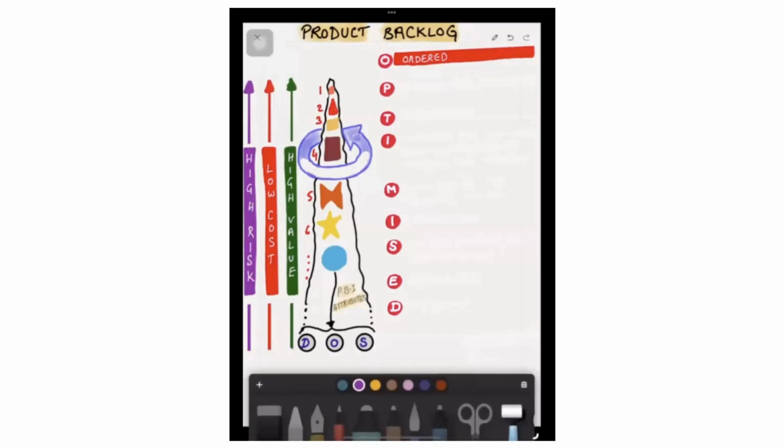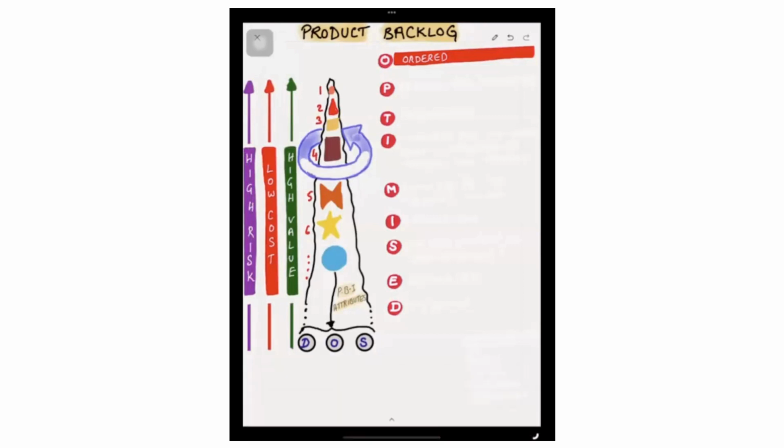The meaning of fail fast, fail safe is if you keep a risky item on the top of the product backlog, in the product timeline, it will come to early sprints. But if you try to push the risky item towards the bottom of the product backlog, in the product timeline, it will come to the late sprint. So in general, it is good to tackle a risky item early in the game so that you will have enough time to tackle the risk effectively.